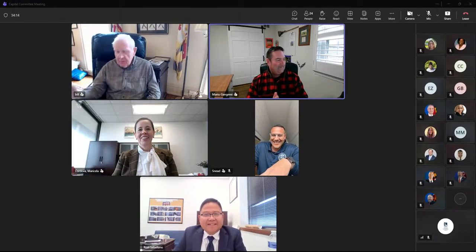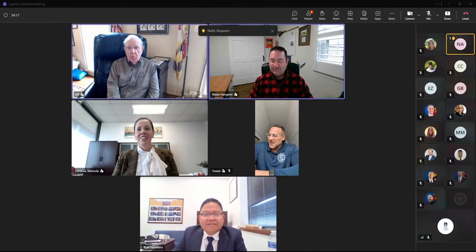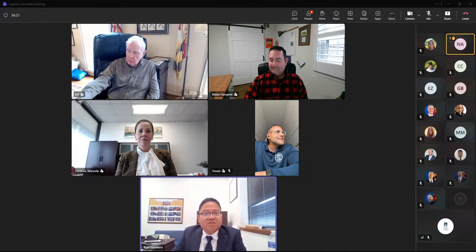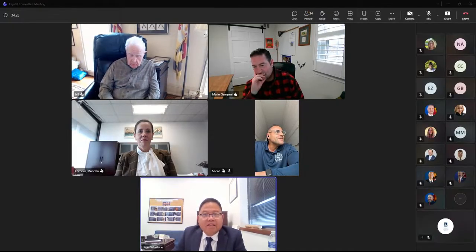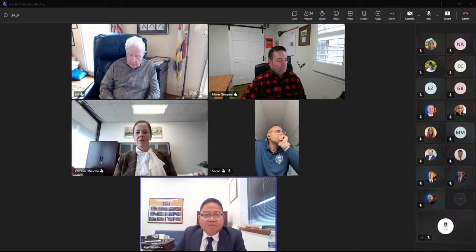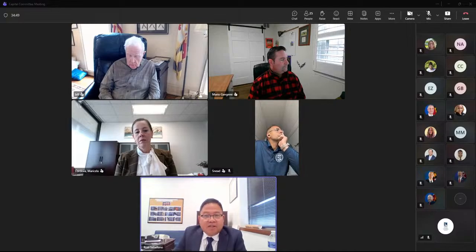Now you can talk about the eastbound Bay Bridge cleaning and painting of the structural steel. Okay. So the Bay Bridge contract I'm going to present today is BB 3025. This is the cleaning and painting of structural steel at the eastbound Bay Bridge, Phase 1. The scope of this project includes the deck truss that has recently been redecked. This contract was advertised in November 2025, and the bids were opened in January 2026. There were 4 bids that we received, and the lowest bid was submitted by Blastech Incorporated in the amount of